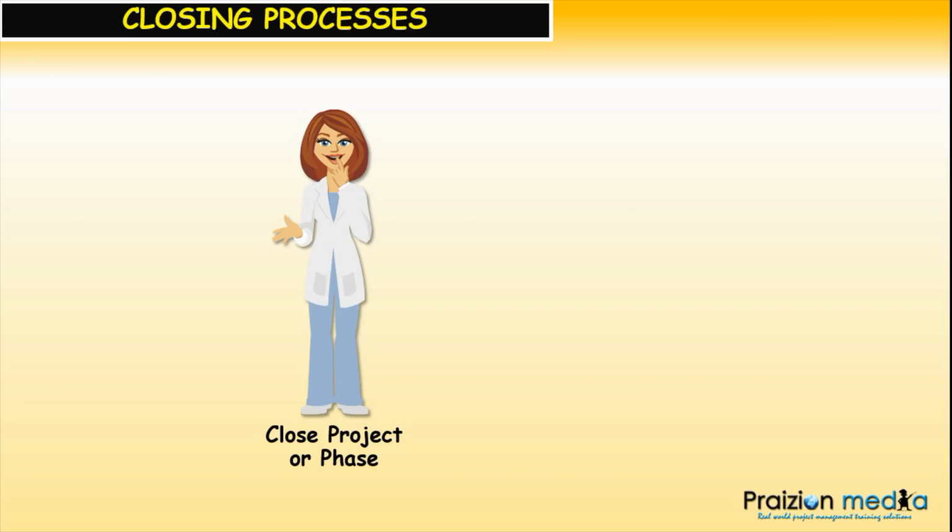If you're closing out a project, gather all the lessons learned, document all the lessons learned, and make sure you don't release the team until they have given you all the artifacts and all those other little things, non-tangibles in some instances, that you identified up front as being some of the project closure requirements.